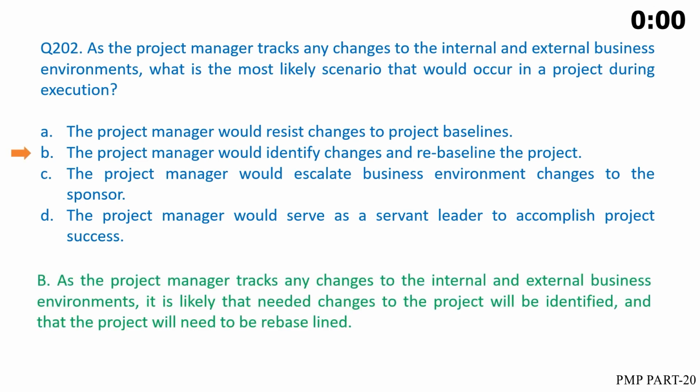The correct answer is B. As the project manager tracks any changes to the internal and external business environments, it is likely that needed changes to the project will be identified, and that the project will need to be rebaselined.